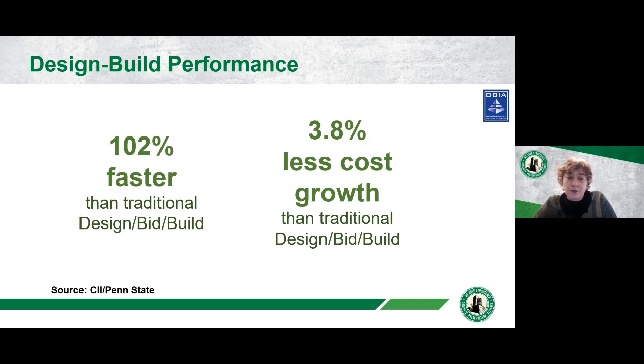Talking about schedule, a key detail when it comes to design build is what I would say is the number one reason, if you ask many owners, why they love design build: how quickly it can be done in comparison with design bid build. And the reason for that we talked about previously is that you can begin the construction activities while the remainder of the design is moving forward.